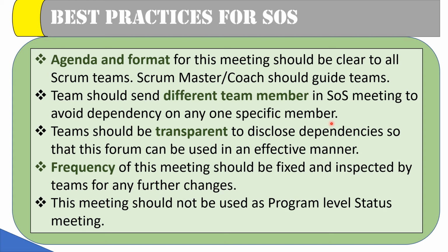Third point is that teams should be transparent in disclosing dependencies so that this forum can be used in an effective manner. That transparency is very important. If team A or whichever team does not want to disclose its issues, then this forum will not serve its purpose. The important thing is that we bring to this forum the necessary issues which another team might be able to help with.